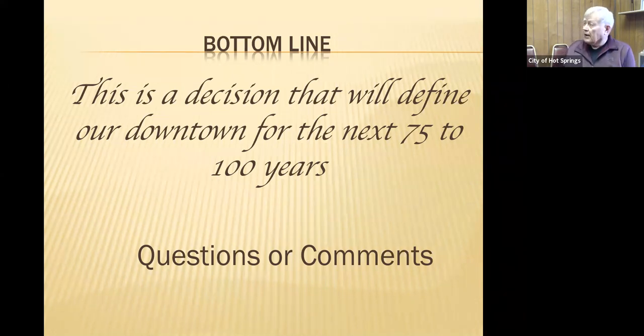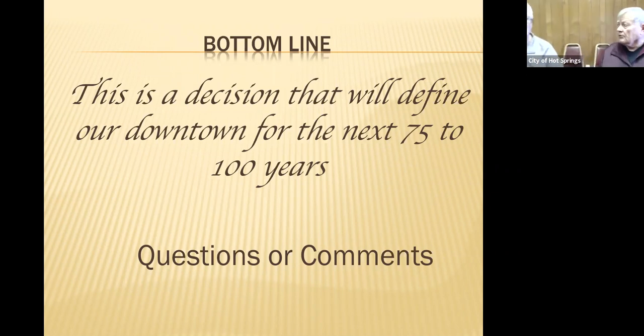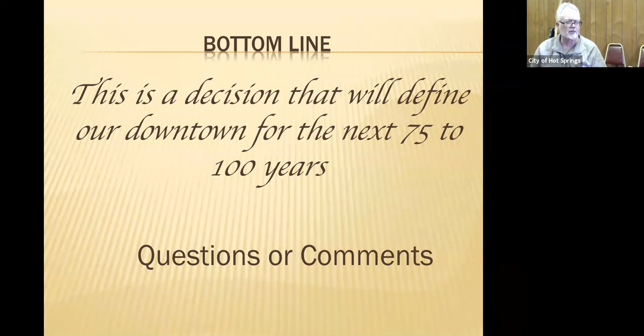John, I don't know if they provided any recent information as to when they're planning on starting and how they're planning on scheduling that. As of this time, we have not been provided an update since the delays with the COVID-19 pandemic. We had deadline dates of September for preliminary design, December for final design, February for bid letting of 2021. Past that date, they haven't confirmed any additional dates or lengths of construction. We are working on the staging intervals of where they will be working at what season.